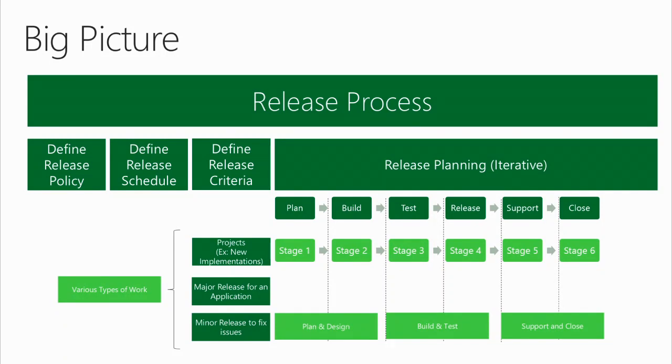So let's say there are changes. In fact, we ran into this scenario sometime last year. I'll take Project Server as an example. There were several Project Server implementations going on, and we all had one test box. So I would make changes. I would add a simple lookup table. Somebody else would see it. The users are testing it, and they're like, where did this lookup table come from? Then my coworker adds another field. Then I see it and I'm like, who needs this field? Delete it. So there was a constant struggle going on because there was no coordination in terms of what each one of us was doing, what we were aiming towards.